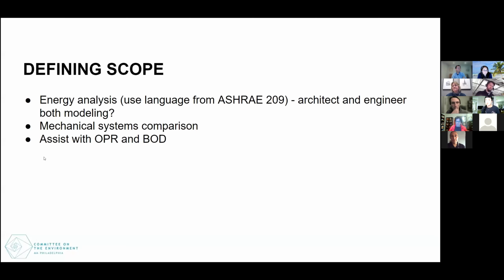So when I was invited to join this panel tonight, we were talking a lot about contracts. And it is true that in the early days of the 2030 Challenge and the AIA 2030 Commitment, our firm was seeing many firms who were contractually obligating MEP consultants or energy modelers to meet the current targets of the 2030 programs. But we made a deliberate decision not to do this. Rather, we invested some effort in developing some in-house tools to make our expectations for building performance and analysis clear so that all members of our extended project teams are working towards common goals.